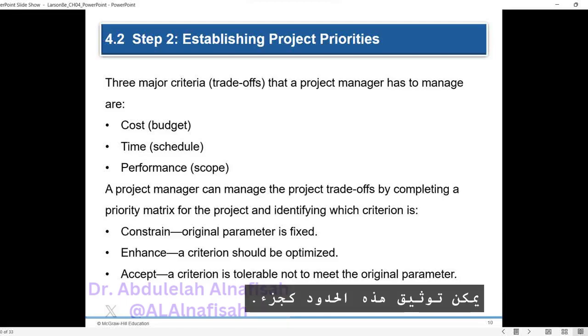These limits can be documented as part of the priority matrix. It is important to develop the matrix before the project begins to establish clear priorities, align expectations, and facilitate adjustments in scope, schedule, and budget allocation during the planning process.